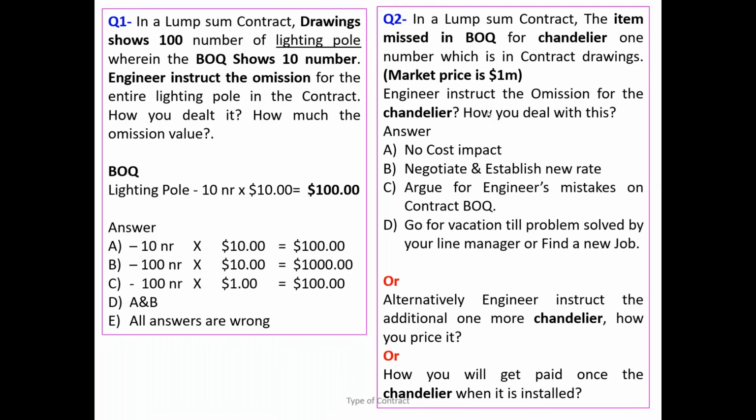Because it is your risk. You didn't do it properly. You didn't do the calculation of the whole scope of works before you signed the contract. That is your mistake as a contractor. That is how you have to understand. It's not the ream as a contract. Look, Mr. Contractor, I have given the drawing and specification. You told me this is the price. Now you can't come and argue with me that you want the extra price because you didn't price it. That is your risk. Nothing to do with that one.